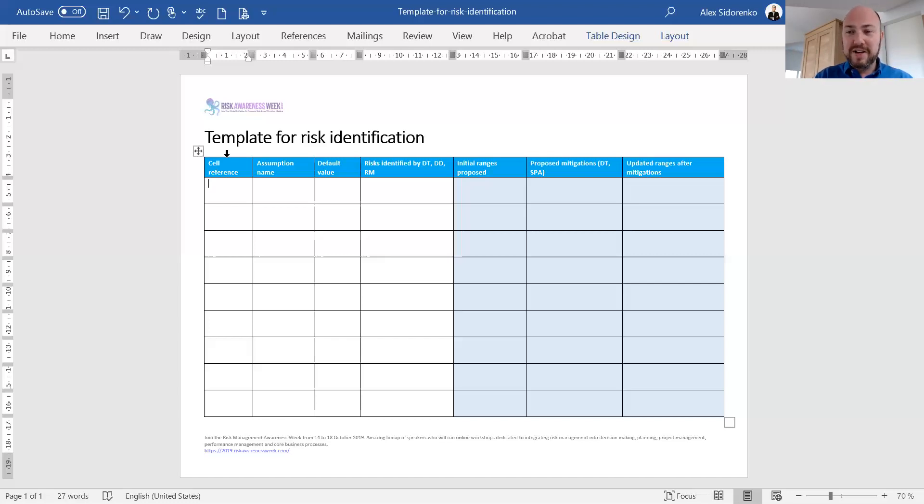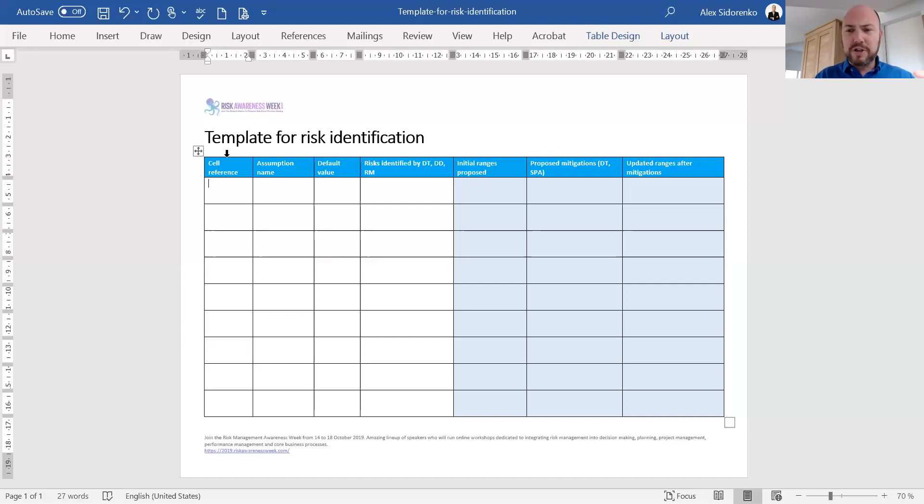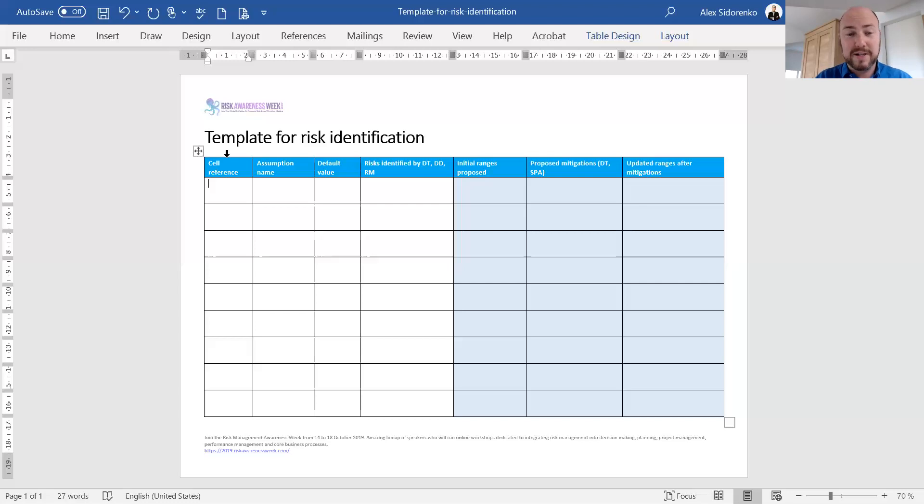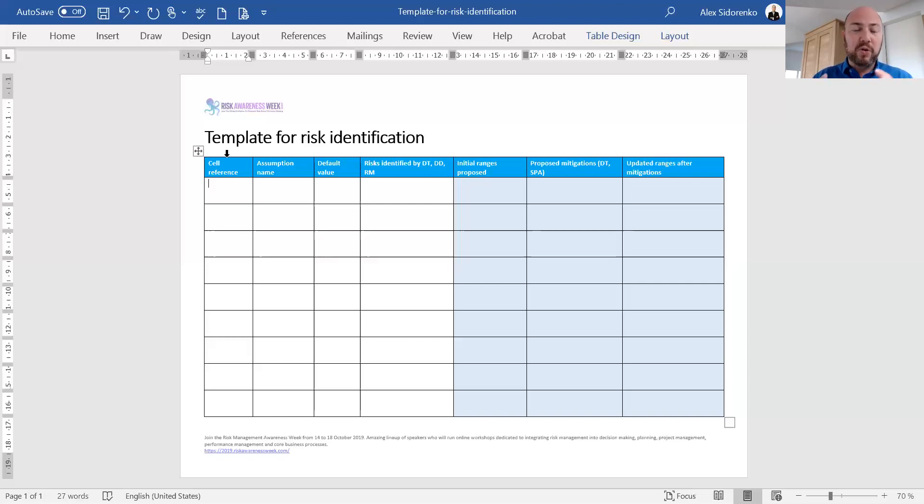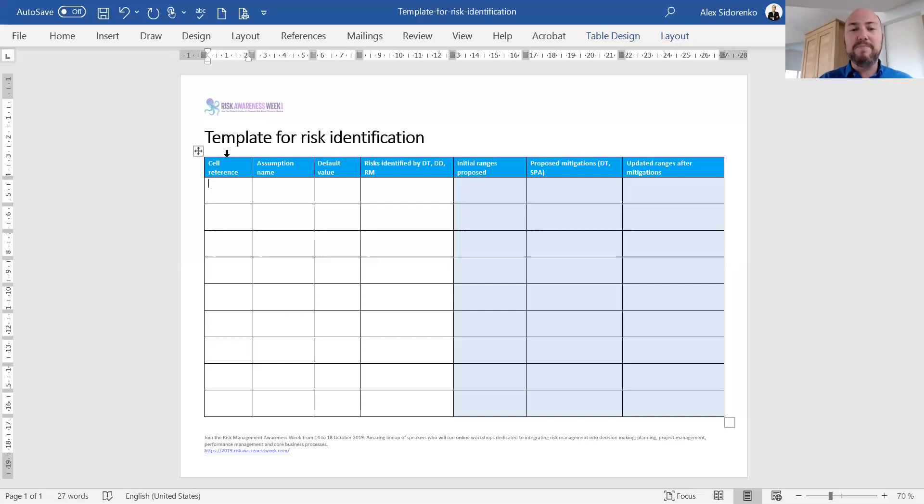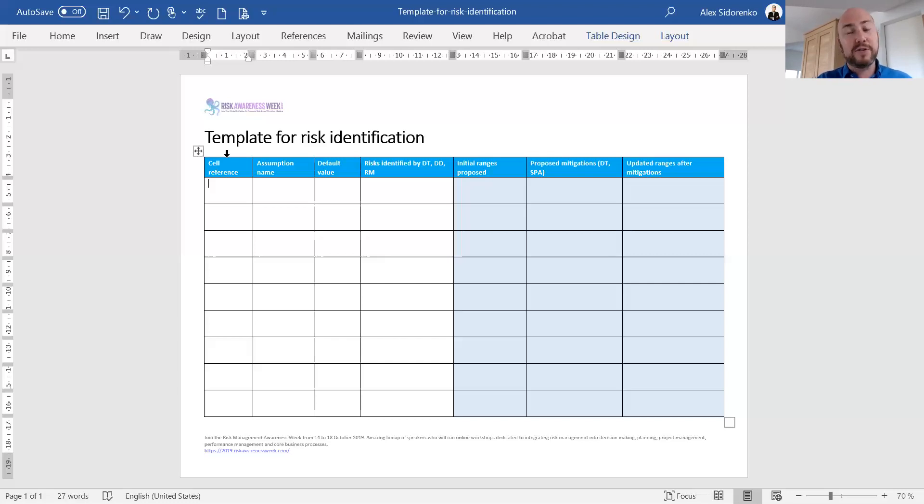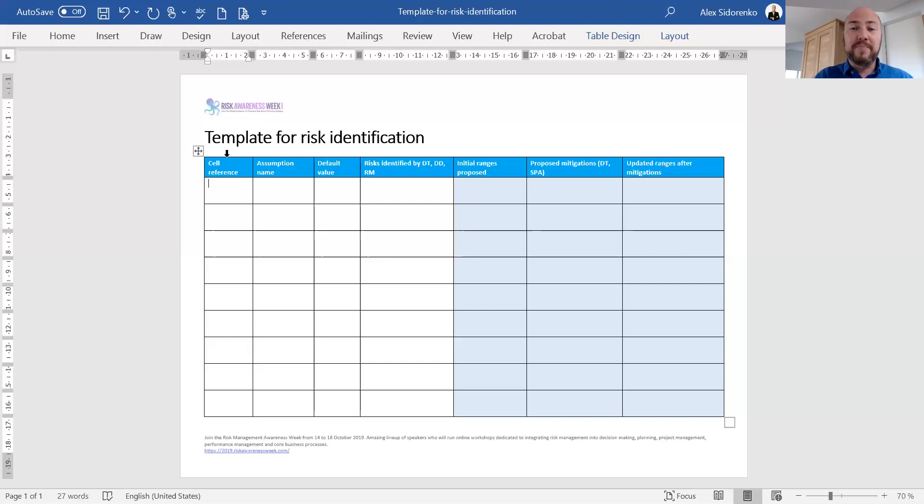Risk identification starts not with the checklist, not with your categories of risk, not with strategic operational financial and reporting or some other nonsense that international best practice guidance came up with. Risk identification starts with identifying all the assumptions that are relevant to a particular decision. Before you can even begin to think about risk identification, you have to understand the decision at hand, break down that decision, find the model—the financial model usually—or a project schedule, or some sort of other representation or calculation where that decision has been scoped or measured or evaluated.